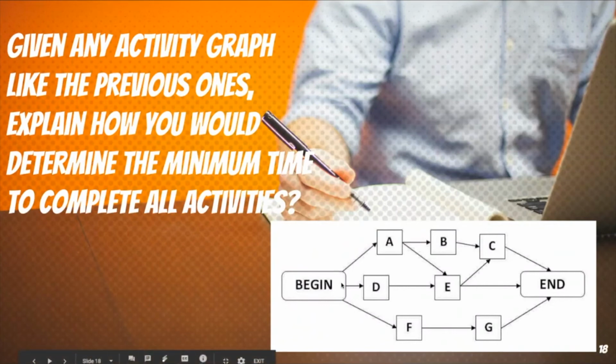How many of you didn't even notice the AE pathway? You see, if D takes a half hour and A takes an hour, we can't start E until A is done, even though D is already complete.